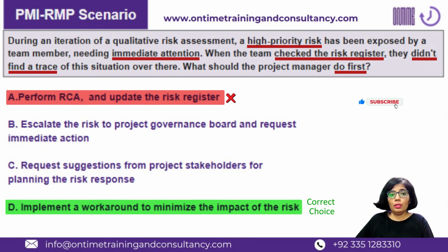I agree. I don't disagree with all of this. But this is exactly the point of discussion, that we do not always go in a literal manner. This is a workaround. The situation we are in and the way we are tackling it would qualify that action as a workaround, because this is not an agreed upon, previously thought through, mutually aligned response plan. Temporarily, this is a workaround for this risk.